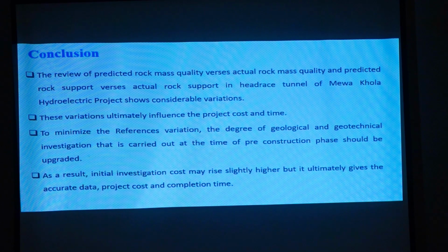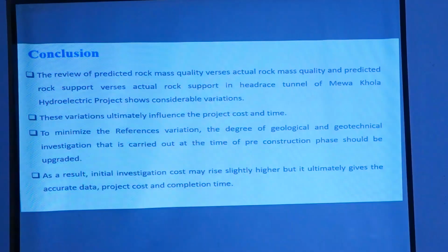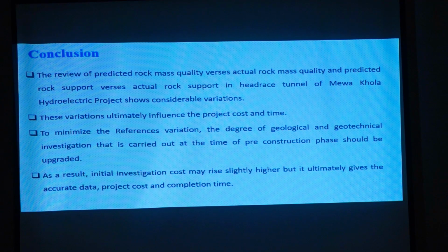To minimize the variation, as already stated, the degree of geology and geological investigation that should be carried out at the time of pre-construction and during the construction time should be upgraded. As a result, initial investigation costs may rise slightly higher, but it ultimately gives accurate data, project cost and completion time during construction, so that the investor, who is investing the money for the construction of this hydropower project, can make up this must cost range for my project. Thank you, sir.